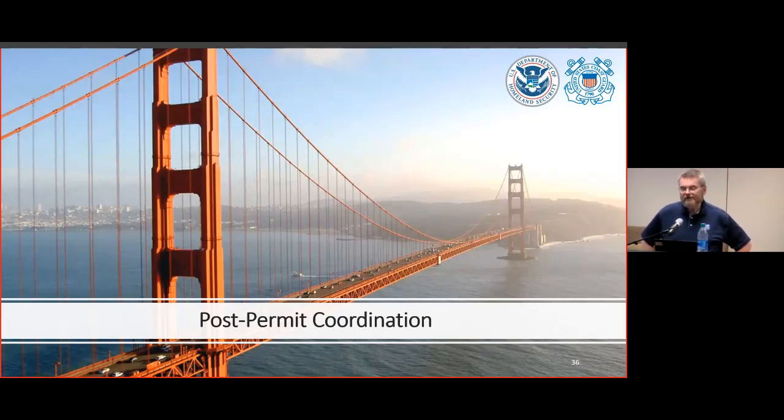Okay. What we're primarily concerned about, particularly when we're looking at a design build, like I said, is making sure that those navigation clearances, e.g. the vertical and horizontal clearances, are baked in. Okay, so we take that for granted. Particularly, like I said, if you're getting a set of plan sheets at 30% stage, things are going to change. But we want those navigation clearances baked in.